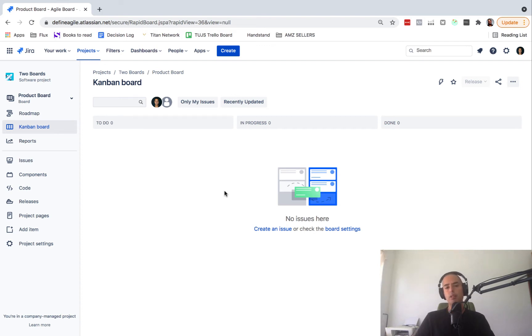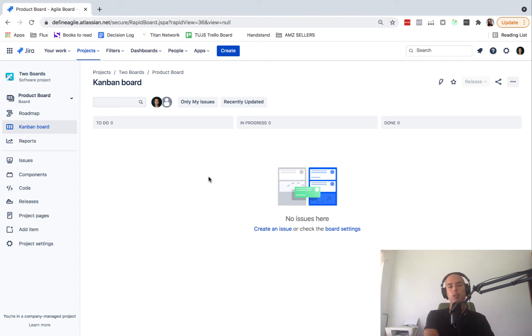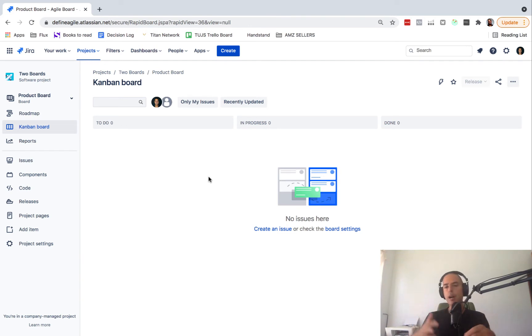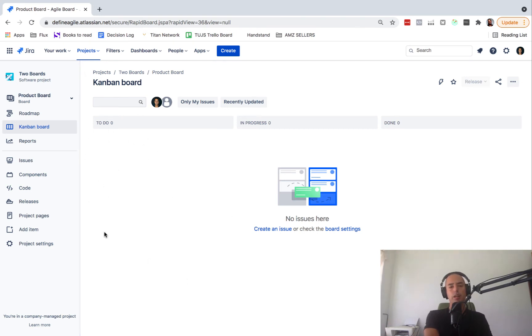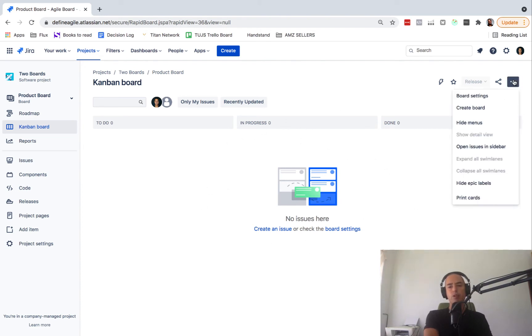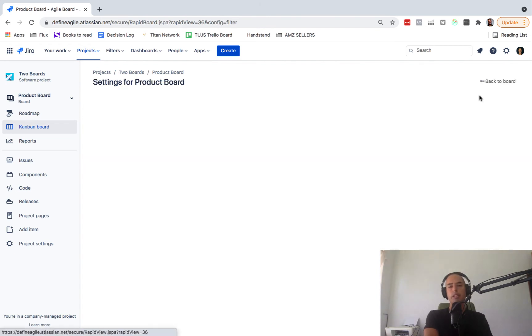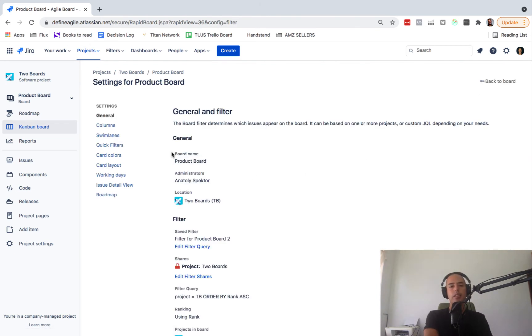Then let's configure this one first. So let's say I'm a project manager and I have my own backlog. So I will put lots of things in here in this board and then I want to work on them. I want to flesh them out. I want to create some requirements. I want to make sure that those look really good before they go to development. So I will just create a very simple workflow. To Do, I have all my stories. In Progress, as I'm working on them, adding some requirements. And then the last one will be Ready for Development. This is where developers can pick it up. So I go to board settings and I'll change Done into Ready for Development because it's not really done. It's done on my end, but it will be done when developers complete the whole story.